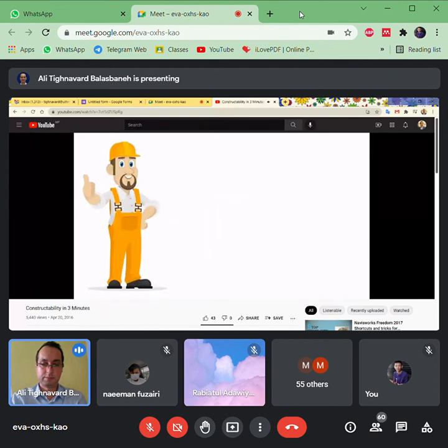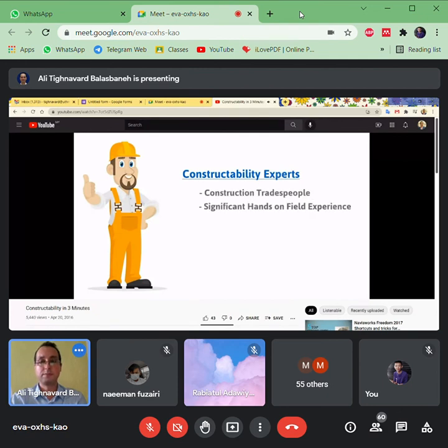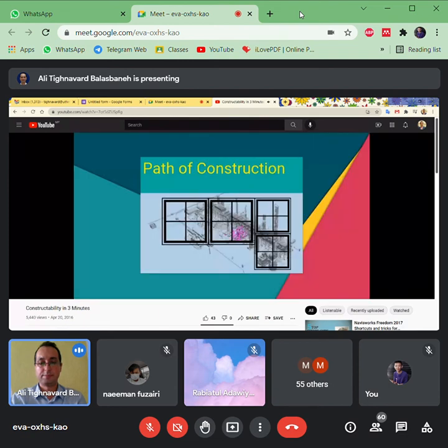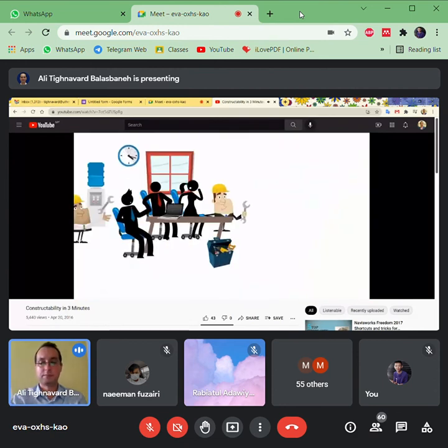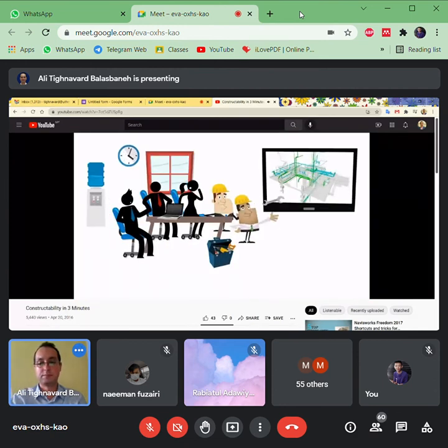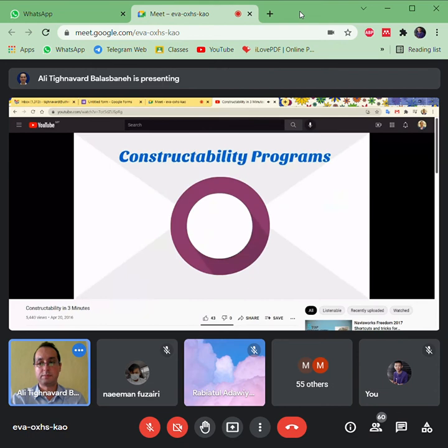Constructability experts are construction tradespeople that have actual hands-on construction experience. These individuals also have extensive supervisory and management experience that enables them to see potential roadblocks and issues that others would miss. The team works together to define the optimal path of construction and aligns the path of engineering to facilitate construction sequencing. Dave's construction experts use Bentley's ConstructSim platform to review the design and plan sequencing within each construction work area and identify roadblocks and design improvements that could improve construction performance.